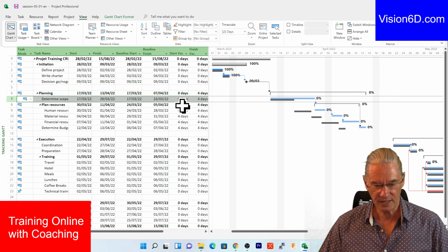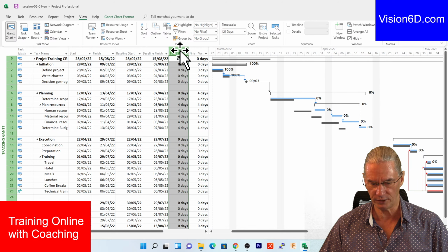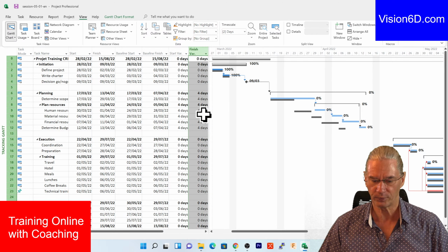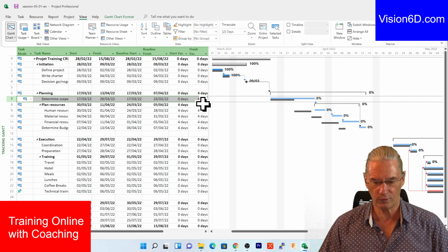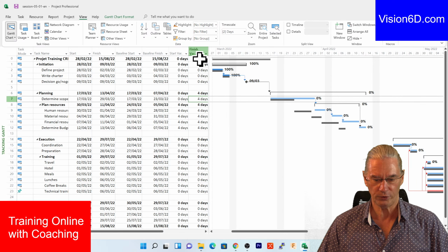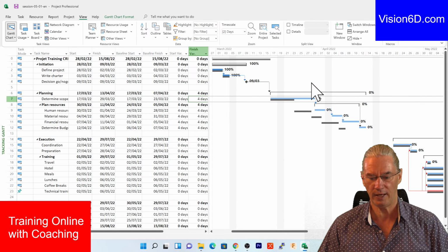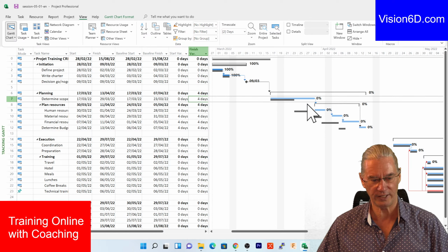And here, this explains that you see from task 9 to 12 in the start date here, as well as in the finish variance, we have 4 days. And if I'm coming here up to the finish variance, you see here that it's reporting that we have now 4 days variances. So this, you see it numerically, and here you see that change graphically into our diagram.